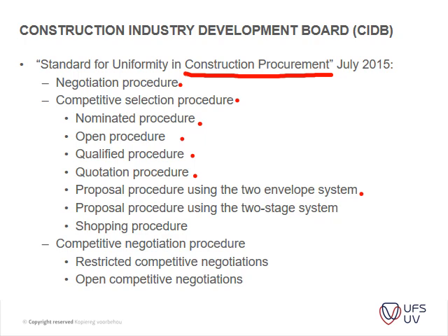So you have the scope and everything. So the guys submit their methodologies, and then from there they are screened, and only then do they submit a cost. So for instance, they will take the 6 best contractors, and then they will give them a chance to submit a financial proposal, so that instead of going through 50 contractors' proposals and cost estimations, you only go through, say, 6 or so. So you just shorten the list.